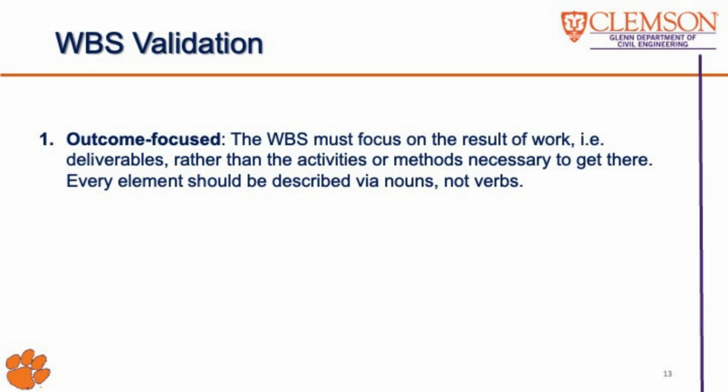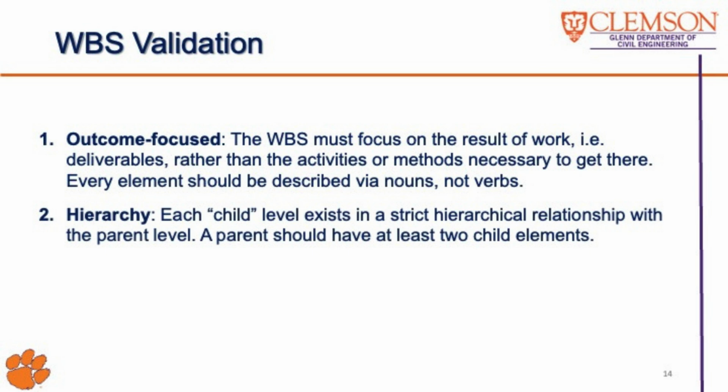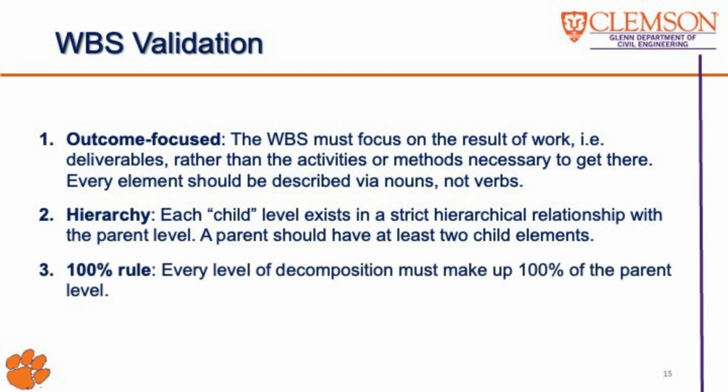First, a WBS is outcome-focused. It should emphasize the results of the work, such as deliverables, rather than the activities or methods used to achieve them. Every element should be described using nouns rather than verbs. Second, each child element must have only one hierarchical relationship with its parent. Additionally, each parent must have at least two child elements. Third, the total effort required for the child elements should equal 100% of the parent level.